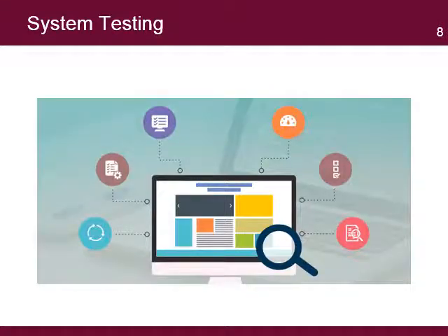The test phase involves the test of all the system functionality per the approved functional requirements. In this phase, the system users test the system to ensure that it complies with the agreed expectations, performs according to design, and produces the information requested by the project. User sign-off constitutes the acceptance of the system by the users.